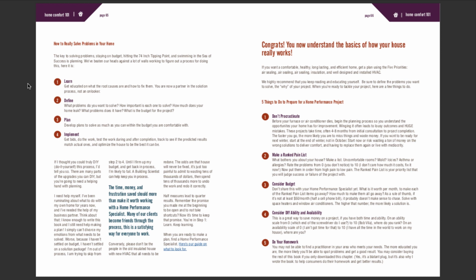5 things to do to prepare for a home performance project. First, don't procrastinate. Before your furnace or air conditioner dies, begin the planning process so you understand the opportunities your home has for improvement. Winging it often leads to lousy outcomes and huge mistakes. These projects take time, often 4 to 8 months from initial consultation to project completion. The faster you go, the more likely you are to miss things and waste money.